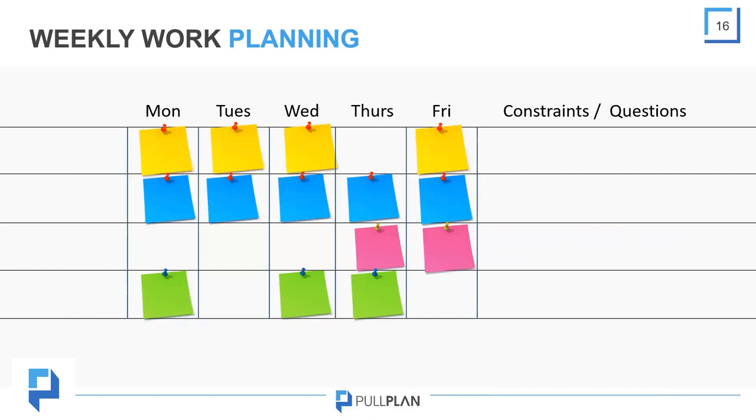So if you contrast this to traditional planning and scheduling methods, schedule reviews are often done on a week or 2 week basis. So by the time the whole team is sitting down and looking at what happened over the last week or 2 weeks, that data is old. So it makes it very difficult to make decisions because you're not looking at what's happening now. You're looking at what happened 2 weeks ago.